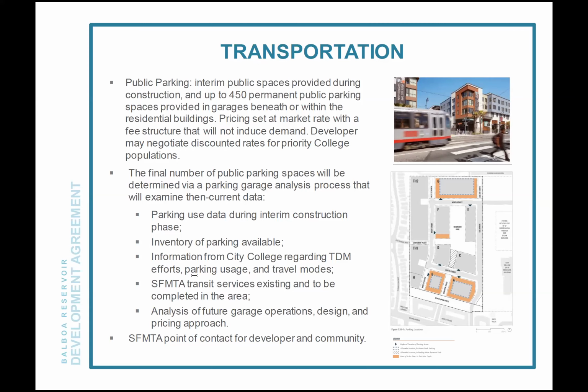No development obligation. It says, there is no requirement under this agreement the developer initiate or complete development of the project or any phase or portion thereof. There is also no requirement that development be initiated or completed within any period of time or in any particular order, subject to the requirement to complete associated community benefits, etc.